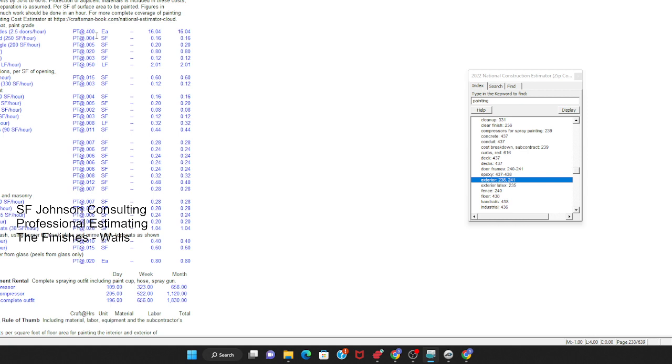So if you know you have 3,500 square feet of smooth wood siding, you're going to multiply this number by 3,500, okay? And that'll be your man-hour total. Whatever it gives you, that's assuming one person is doing it. So if you got 2 people, that's 16-hour days, okay? If you've got 3 people, 3 times 8, 24 hours you're going to use in a day to do any job. That's how we determine our work breakdown schedules and our construction schedules.